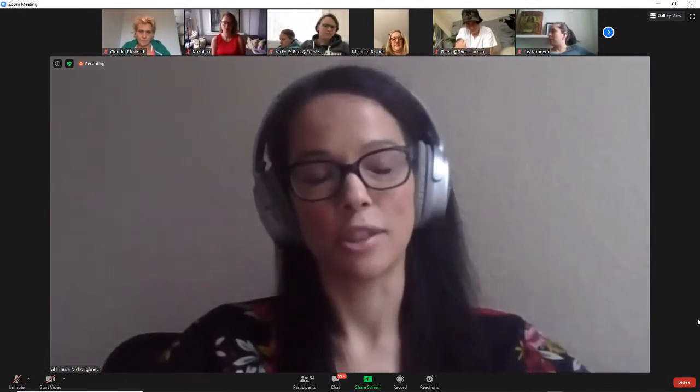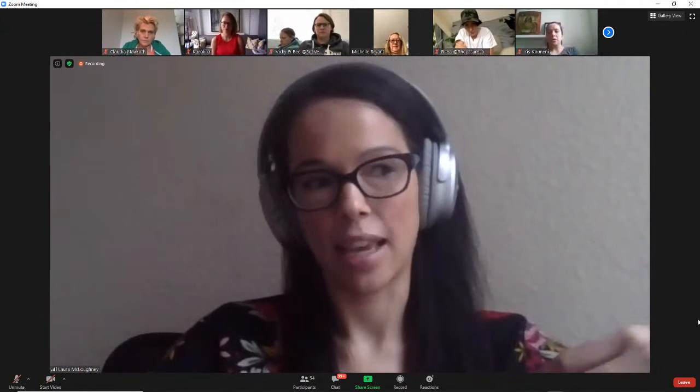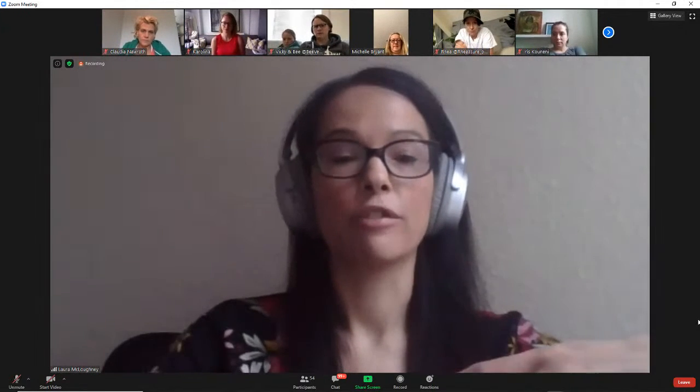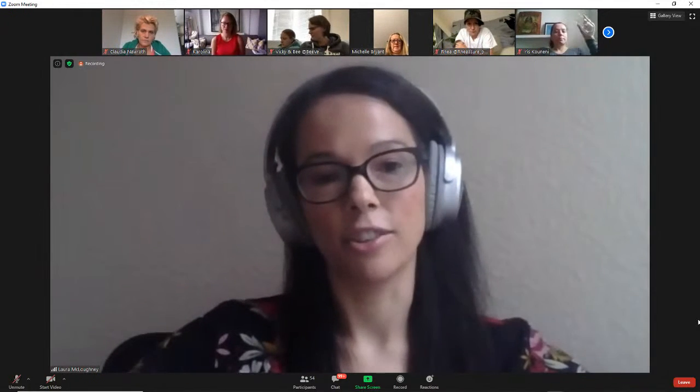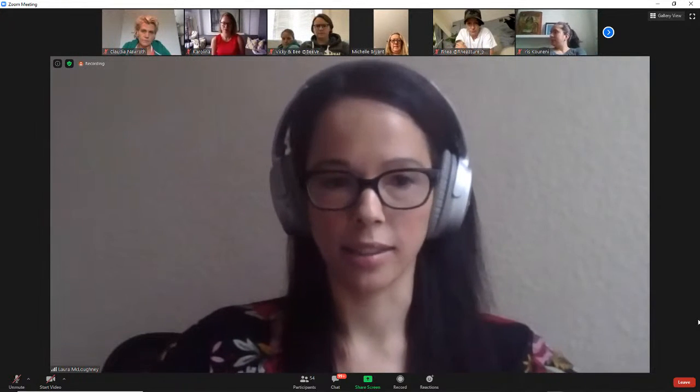And then after that, I go to my QS or a contractor and say, okay, look, this deal looks really good. We've stacked it to this. Is this realistic? Do we need to adjust? And then we'd start understanding, well, they'd be like, Laura, you need piling and that's going to cost a fortune more.